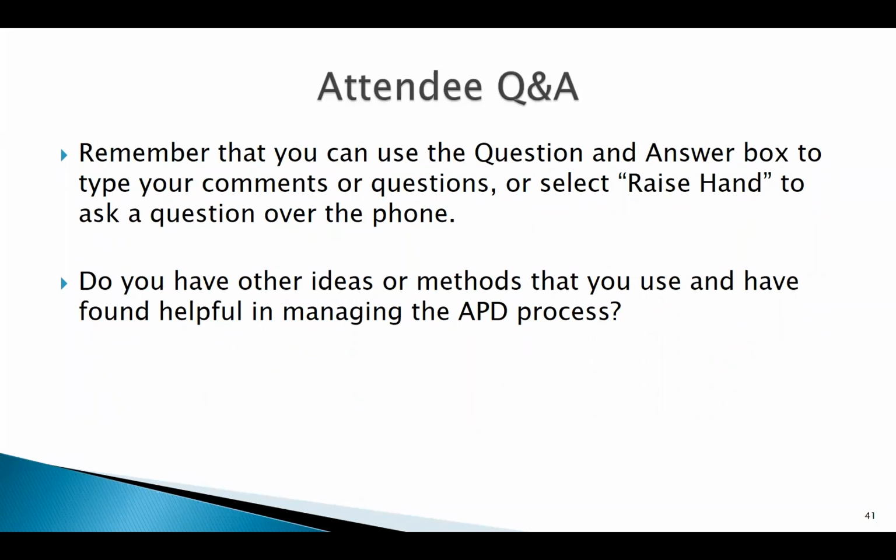This particular attendee expressed that they've run into issues where it's assumed that they can put more people or staff toward developing an advanced planning document to get it done faster. But for those state staff that are core to developing them, they believe it's critical to have people who know the business and the technology and project process knowledge, in addition to the project manager type skill set and the understanding of the various components of advanced planning documents.